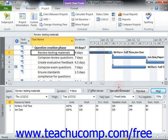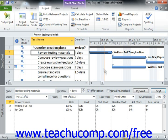Now note that after you update the project's progress, the individual tasks listed within the Gantt chart view of your project file will then display a small check mark in the far-left Information column to mark them as completed. You will also see the Task Progress indicated by a progress bar that highlights the tasks in the bar chart at the right side of the Gantt chart view within your project file.